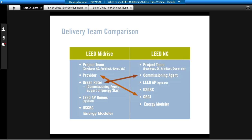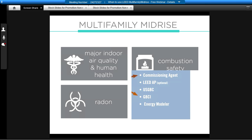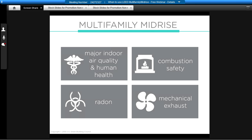We do some HVAC commissioning, such as testing flow rates, CFM flow rates for HVAC supplies, as well as for exhausts. We want to make sure bathrooms are pulling moisture out, so we check the flow rates as built, as well as kitchen exhausts, and also check the fresh air ventilation going to the units too.